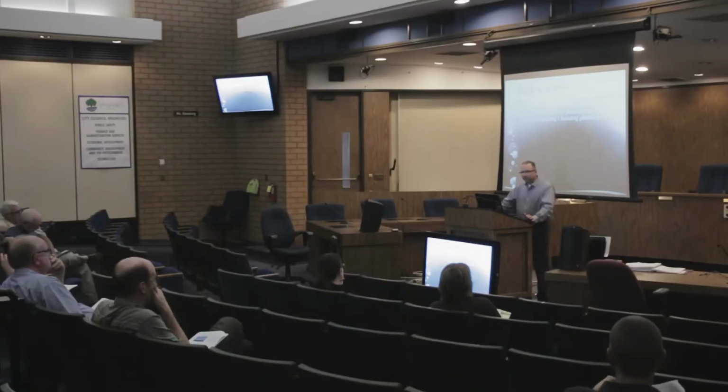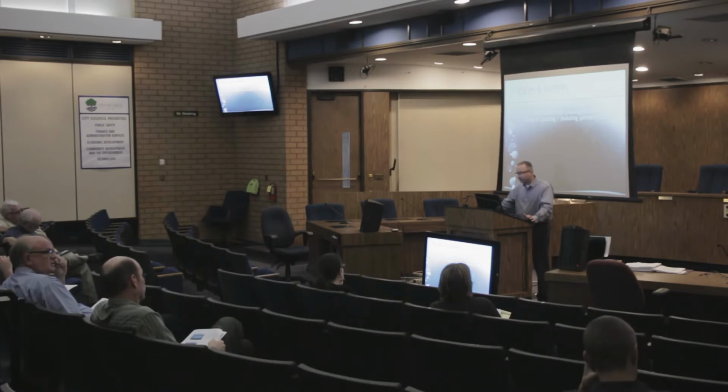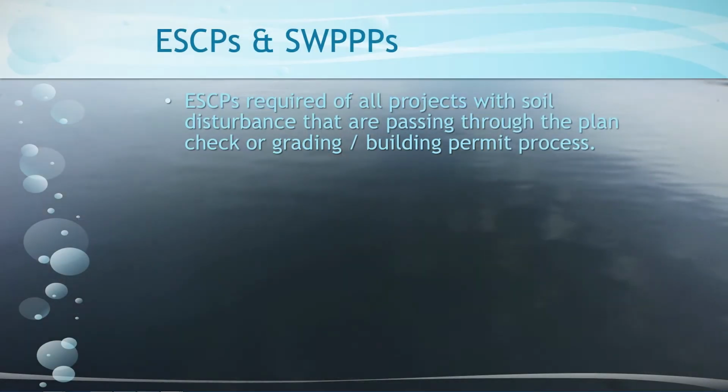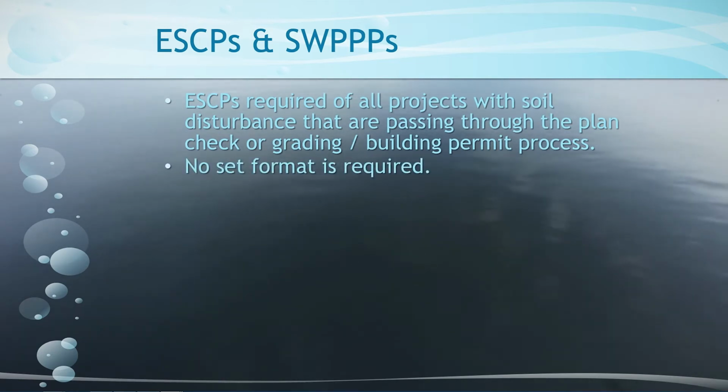So erosion and sediment control plans, that's why we're here today. So let's focus in on that requirement. They're required of all projects with soil disturbance that are passing through the plan check or grading or building permit process, as I just said. Now, the permit does not specify any specific set format, and so we have developed a format with the City of Chico to basically come up with something that's a little more user-friendly.